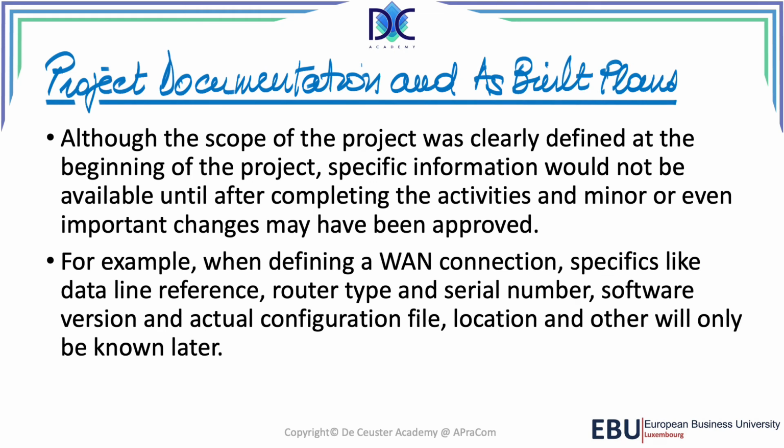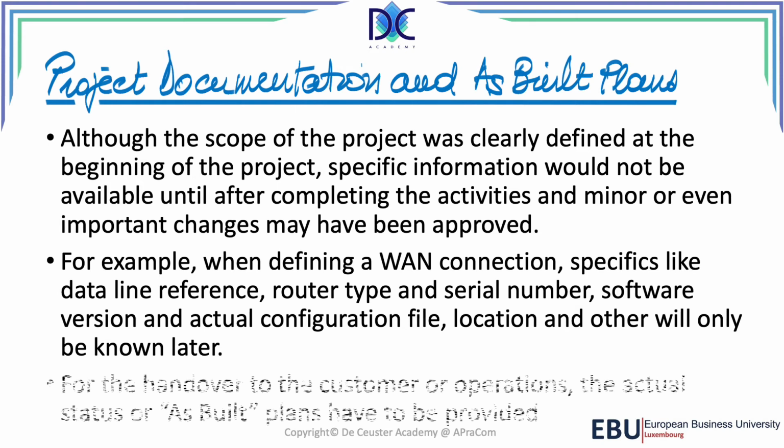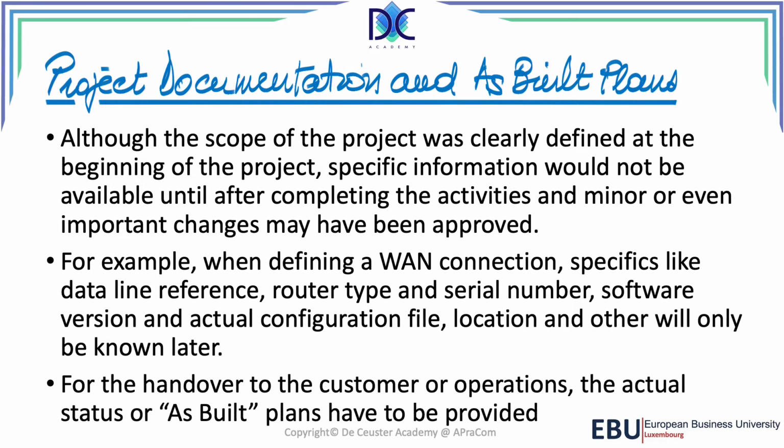We have to find that later when we want to upgrade and when we want to do something with the installed project. Of course, when there is a problem, the support will have to be able to identify where the problem is, and when we do changes, we also have to know where to find the different information. So basically, the handover to the customer or to the operations is done by what we call the as-built plans. We provide all the finished information to the customer or to the operations department.